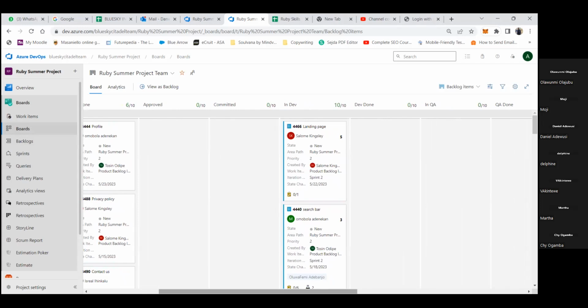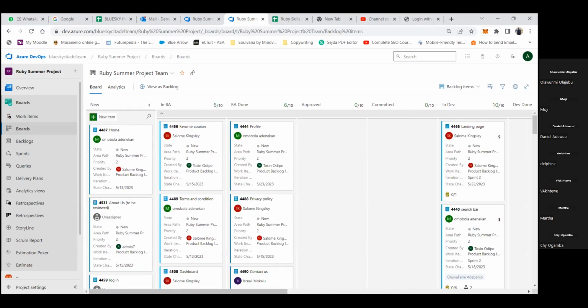Daniel, scroll to your left. Okay. So from new to approved represents your backlog. Do you understand? Yes. Okay. So those four columns, new, in BA, BA done, approved, are all categorized as your product backlog.